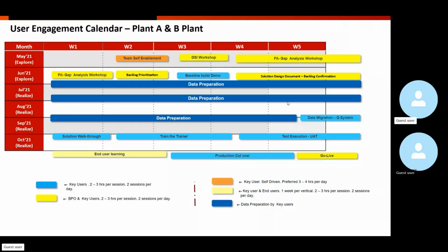Number two, within that scenario you understand what fields you will share, what fields you're expecting to receive, what is the type of integration, asynchronous or synchronous, who is going to do what, how the API function triggers, what's the frequency. All these technical things the integration lead will discuss with the third party applications team and finalize. This happens as part of prepare only.